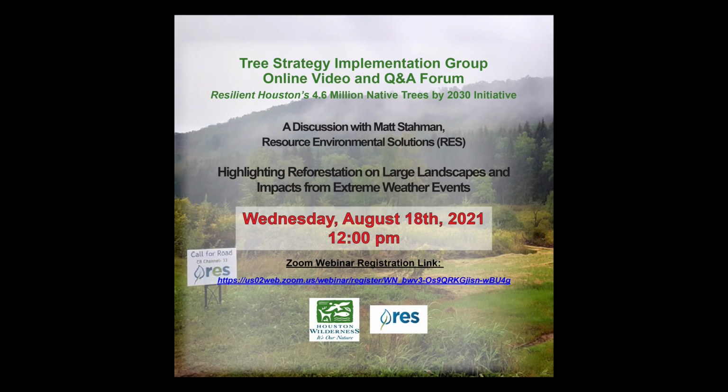This is the contract for that mitigation project. If you can see, it's as tall as my head. It includes a section about that thick on success criteria, most of which came straight out of the permits from the U.S. Army Corps of Engineers and Texas Commission on Environmental Quality, most of which are pointing back to the mitigation plan that was developed over the 10-year course of their permitting effort with those agencies. So we've got a very thick list of success criteria specific to each individual habitat.